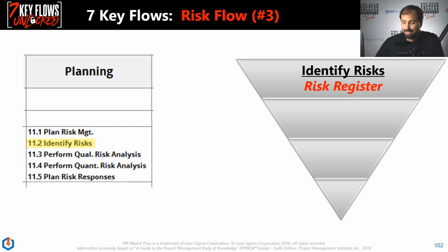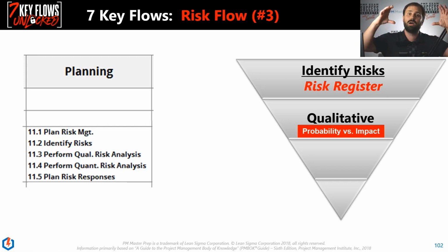So we roll down next into perform qualitative risk analysis. Now, what that does is we take a rough cut. We take a feeling, a belief, an understanding right now of what the probability and impact is with each risk. Now, what's that going to do? It's going to sort our risks up top, in the middle, down below. All right. So the big ones, risk and opportunities, bad things and good things could happen. I only think negatively, but good things do happen. And so we want to understand the probability of each so we can rank them. All right, cool. So as we get down there, we're going to have that sorted list of 569.